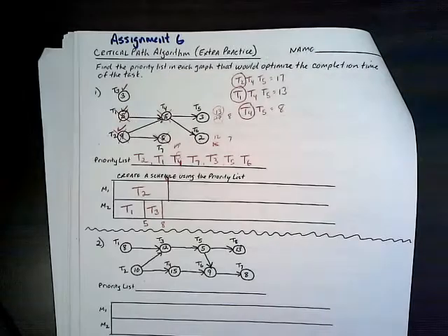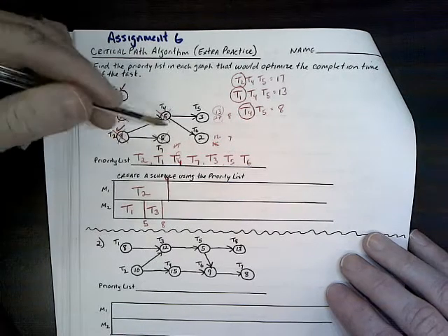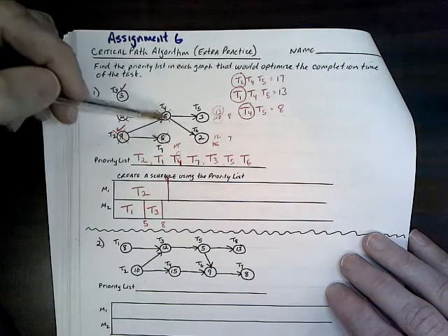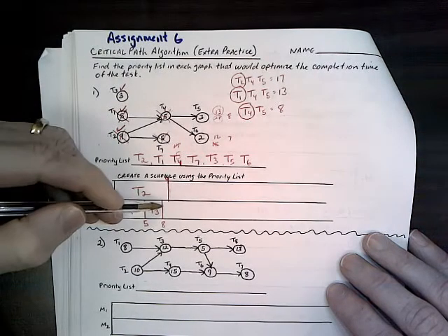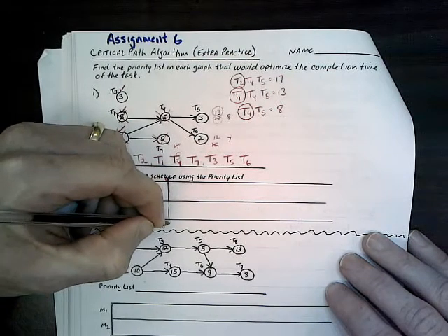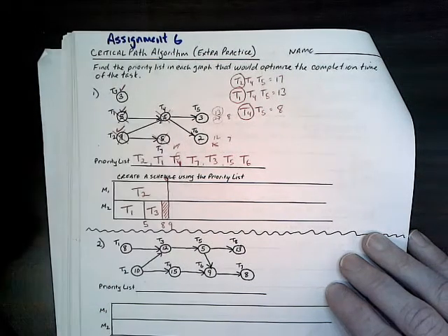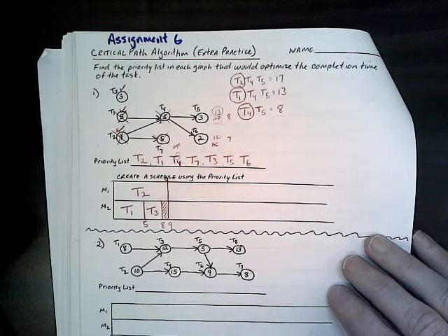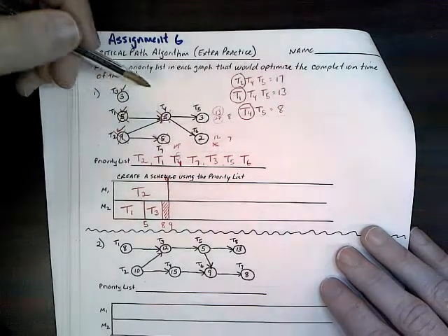Okay? So in the meantime, when T2 finishes at the 9-minute mark, these are the next 2 that can start. But we're not going to be able to start anything at 8 minutes. So we're going to have to bring this down, label it 9, and you have a 1-minute block of idle time. Okay? So now we get to 4 and we get to 7.